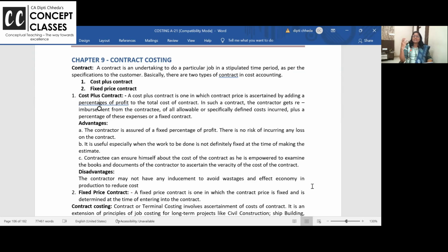In contracts, the prices of items like iron, steel and cement are fluctuating. So how are you going to make it in 50 lakhs? That's the problem for the contractor. And for the contractee, if he says make it in 50 lakhs, the contractor might deteriorate the quality. All these disadvantages are not there in cost plus. It is your house. You want simple Kota flooring, fine. You want vitrified tiles, do it. You want Italian, whatever you want to put, put it. Whatever the house cost, on that percentage they will charge. This is the same for interior decorators and for builders also.